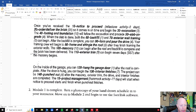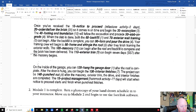Right at the very top, once you've received the notice to proceed — activity 10 — you can order and deliver brick so it comes on time, and begin the excavation, activity 30. So once you've received the notice to proceed, you can then order and deliver brick so it comes on time to begin the excavation.